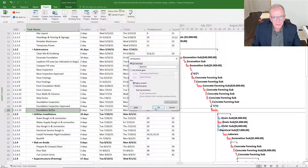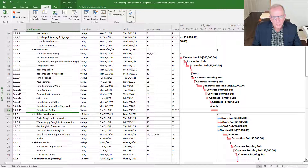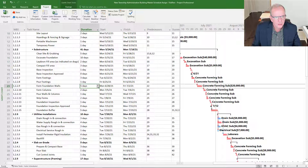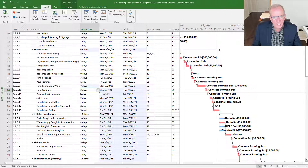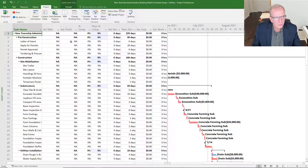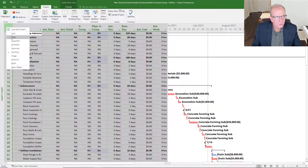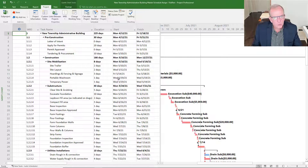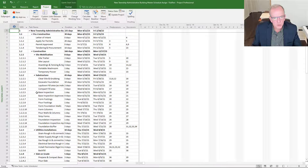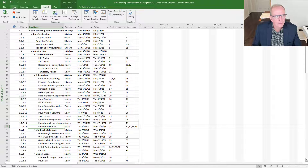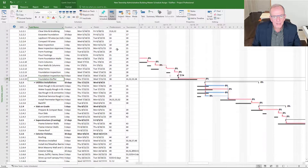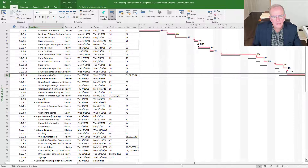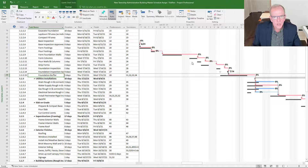I'm going to go to the Project tab and set the baseline very quickly. Setting the baseline takes a snapshot so we can see what changes have occurred. Let's say that 'Form Foundation Walls' took seven days instead of the planned duration. I would have updated those tasks as 100% done with actual dates in the tracking screen. Going to the Tracking Gantt, I can navigate to Foundation Buffer and see that this delay — the extra two days — has pushed my project out by two working days.